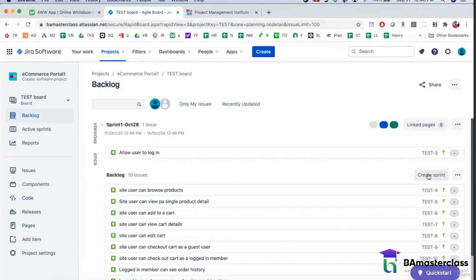Your sprint duration and everything is defined before you begin your Agile project. You have to come up with definitions as to how long my releases will be and how long my sprints will be, and accordingly you design everything in your software. Once you start your release, you do not keep changing your sprint duration. It's a fixed sprint duration for every release.